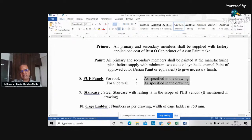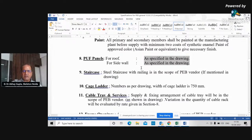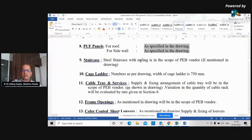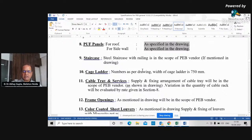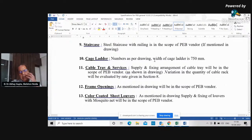If puff panels are specified — their thickness, density, and profile should be clearly mentioned. Steel staircases with railing should be specified, including what type of tread — checkered plate or stone. Cage ladders to go to the roof should be shown on the drawing, must come at least one meter above the ground floor so a person can climb comfortably, and should be lockable from the bottom to prevent unauthorized entry. Cable tray support structures — whether in the scope of PEB or the cable supplier — must be clearly specified, along with loading to be considered.